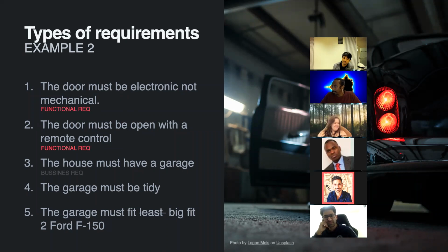But what I like about this one is that you went way faster in comparison to the garden example. So we are starting to get a little bit more of a hang of the requirements. As long as it is broad, it's probably a business requirement. When it's super specific, it's a functional one. And if it has more details, but it still is something that you cannot put in specifications, especially in coding, then it's probably a non-functional requirement. So, okay, with this information out of the way.